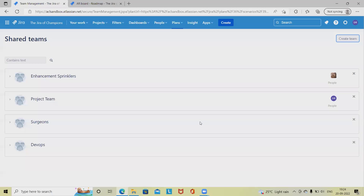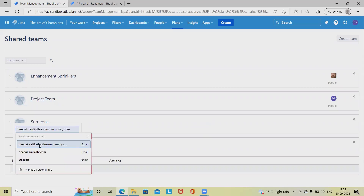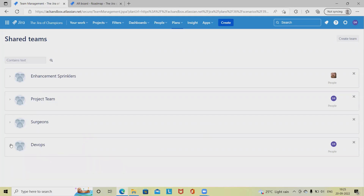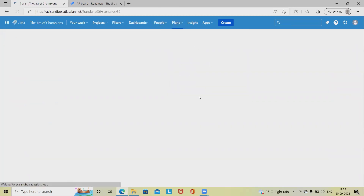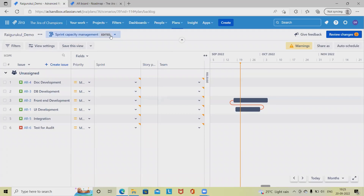I'll define the name as 'DevOps', select the options, and click 'Add Person' — here I'm selecting my name and adding people inside the team. Now our team is ready. We have four teams available. To go to the plan, we navigate into the plan section.